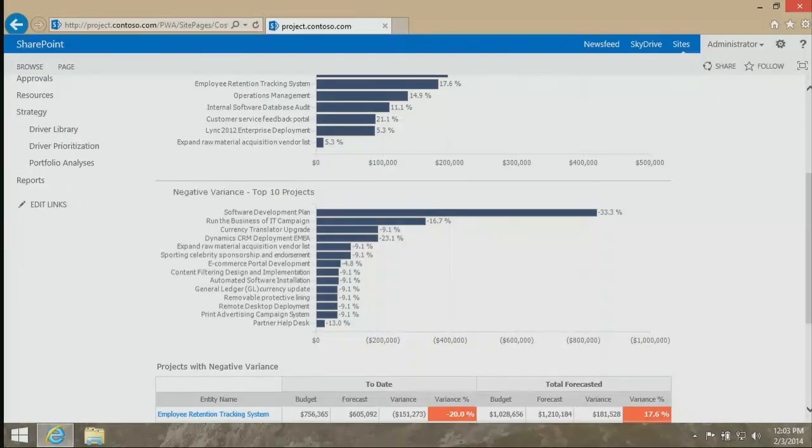And again, I've mentioned Frank LaRocca 3 or 4 times now, and I'll mention him again because this is the genesis behind what he's doing at Con Edison. He's got a dynamic allocation, what he calls a sweep process, where he's continuously looking at these variances and looking to optimize the spend. So take money from the second bucket here, give it to the top bucket, or bring in new, continuously looking to optimize that capital spend and maximize the overall business value from the portfolio. So, clear on the first two buckets here?